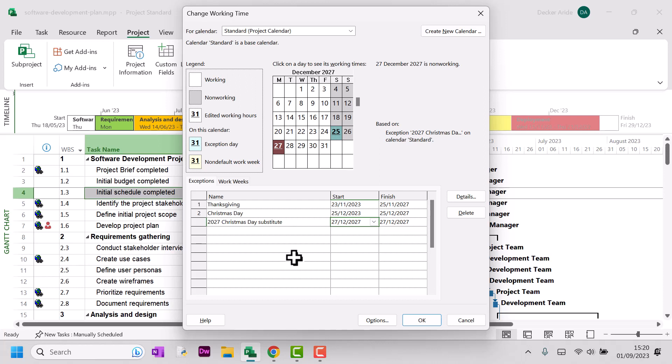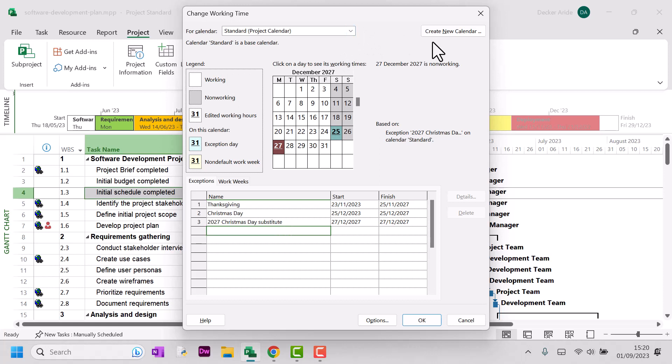And, of course, you also need to consider public holidays for members of your team who work in different countries. In those instances, it can sometimes be really useful to actually create custom calendars that apply to resources that work in different countries. And we'll go through that in another video.